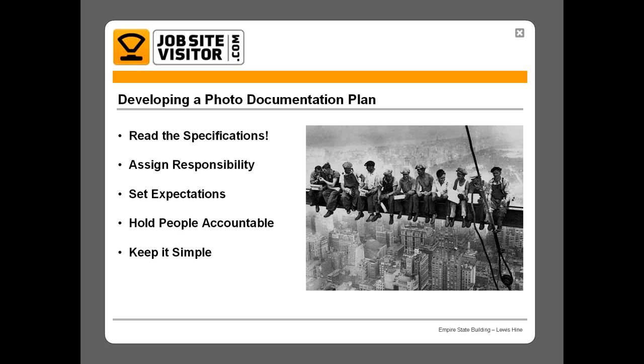The other thing that people should start out doing is keeping their progress photos simple. You don't need to take a ton of photos, but you need to take photos on a regular basis. So don't get too carried away. Don't have people go take photos of every wall every week, but you'll want to make sure that they are taking photos on a regular basis from the same location, and it's going to provide you a lot of great information if it's done properly.